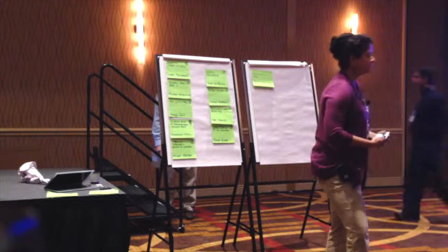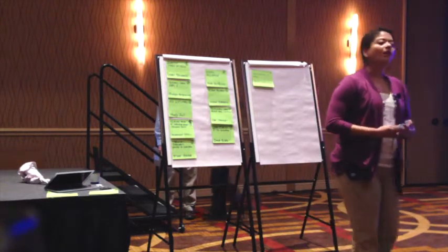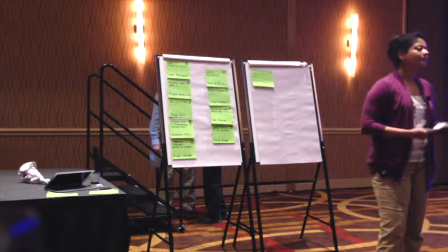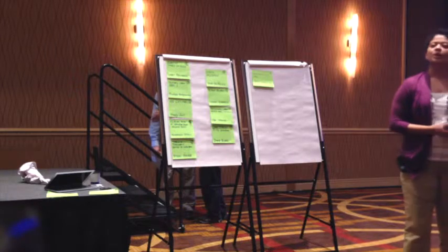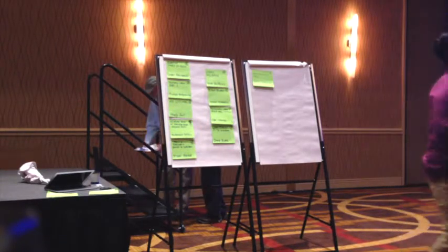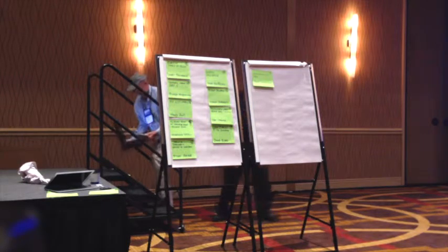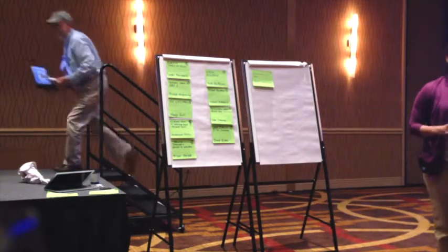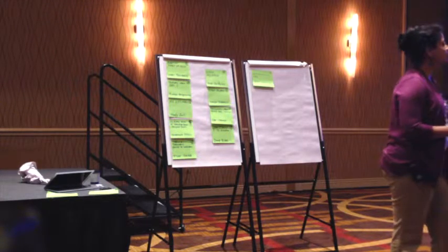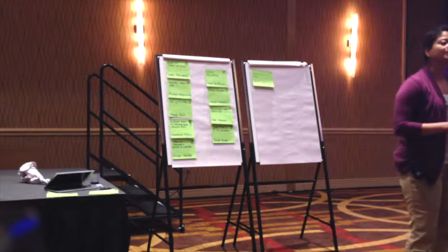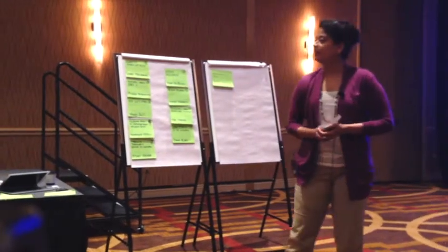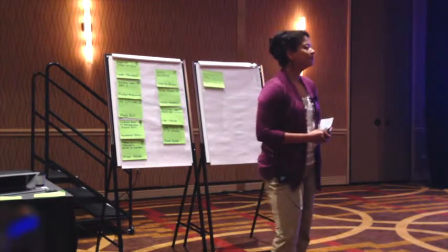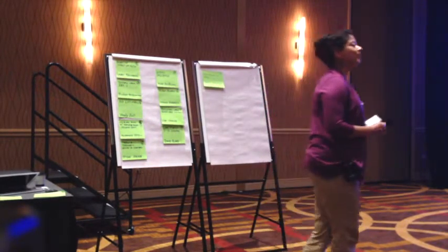Technique number two, pairing between specialties. We all are very familiar with developer and developer pairing from extreme programming, very popular there. What if a developer pairs up with a testing specialist? Let's say on day one of your sprint, your developer writes a small piece of code and they are following it up with a unit test. Better yet, if they are practicing test-driven development, the first thing they'll be doing is writing a failed unit test.